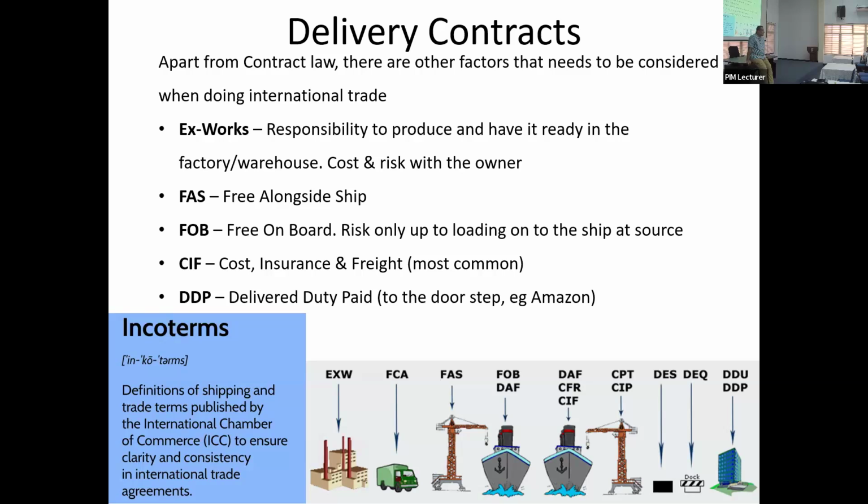But on the way, as the ship is coming, the sugar price has dropped in the world. Now each container is only $500. But you have bought it at $1,000. The moment the ship comes and stops in the port, the bank will pay. There's nothing you can do to stop it. That's what LC means. The moment the ship comes to your port, you have to pay the $1,000.